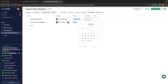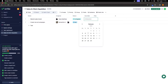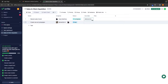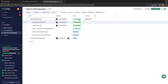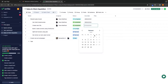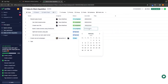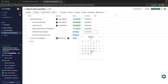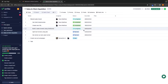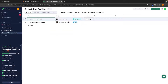We can also set due dates over here. Today is currently the 7th of February. Maybe I want to say that Dave has the rest of the month to do this, so this is due by the end of the month — and that is now set as the due date. We can also set due dates for each of these individual subtasks. So maybe this one is due by the 9th, this by the 16th, this by the 20th, then the 23rd, and then the 29th. Now all of these individual subtasks have due dates and the overall due date is set at the top.